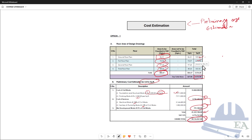This is how you do the preliminary cost estimation. Once the client receives the cost estimate, they know whether the project is within their budget. If it is, they will proceed. If not, they may try to reduce the area or the number of floors — whatever adjustments are needed through discussion. This completes Stage 1, where you prepare the preliminary design and preliminary cost estimate.